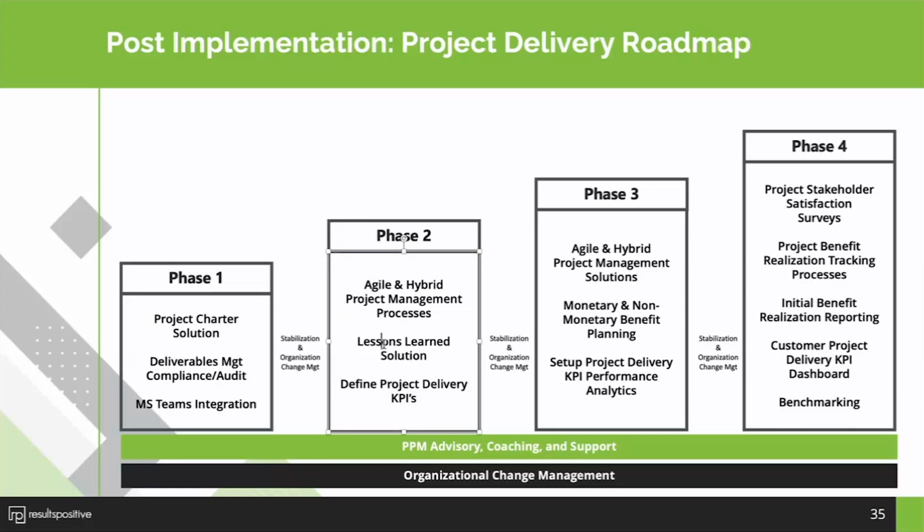methodology. Lessons learned. So this is a great solution we've done for customers using the knowledge base. So it's a great way so you can continually search and review previous lessons learned on projects to help the performance of new projects.